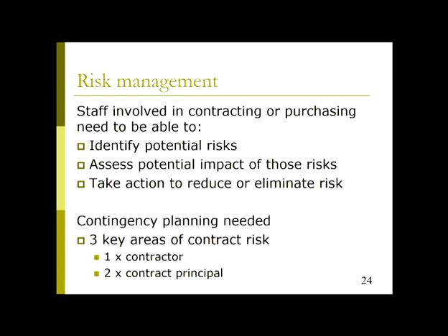So this is something that you need to do in your project plan. This is contingency planning, essentially. You're identifying the risks, you're working out what the probability and the consequence of those risks are, and you're looking for ways to either avoid the risks or minimise those consequences.